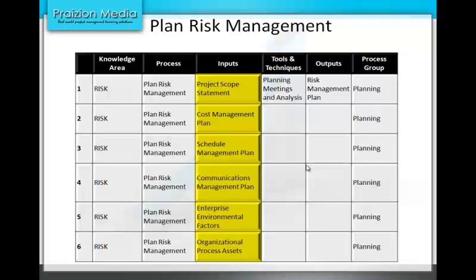In the risk management plan, we talk about the methodology. How are we going to do this? We talk about the roles and responsibilities. Who is going to do what as far as managing the risks, as far as leading the team, supporting the team, who are the members that need to take part in this. Now, in some organizations, it's just a project manager that does everything. But in other organizations, you have a risk manager, a dedicated risk manager, and so many other people.